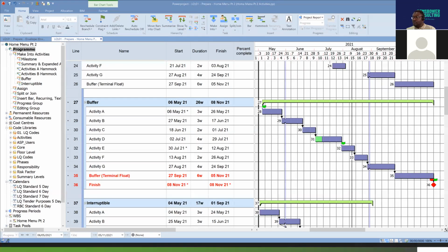So buffer tasks are also known as contingency plan, like I've said before, and they can be used within projects to protect important dates and reduce excess float. Buffer tasks which do not have float instead shrink or expand in size as required without moving beyond their finish dates or the start dates of successors.